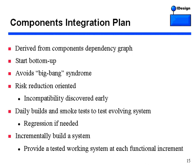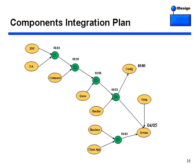You start implementing components bottom-up, imposing your project's Gantt chart on top, where milestones are your integration points. What you're trying to avoid is the big bang syndrome — where a bunch of developers work on a bunch of components, then bring them all together and try to integrate them. That's a recipe for failure. The only way to do it is using continuous integration: as you go along, you incrementally build the system and integrate individual parts. Doing it bottom-up with integration points is very risk-reduction-oriented because incompatibilities between components are discovered early on.